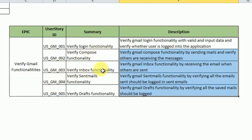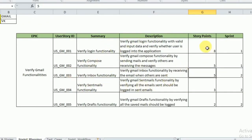Once user stories are created and documented by the product owner, in real time, at the beginning of the sprint, we have a sprint planning meeting. In the sprint planning meeting, we are going to give story points for the stories. Story points tell us what is the complexity of the user story. Usually story points are in the form of Fibonacci series — 1, 1, 2, 3, 5, 8, 13, 21 — and each and every story we need to give story points.